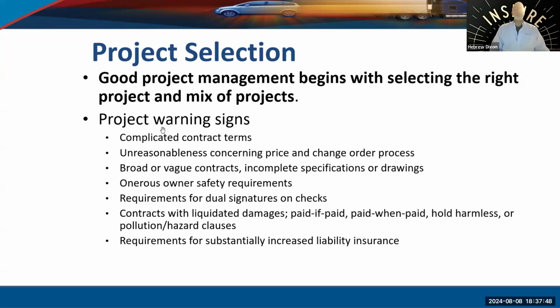In the contract, again, this is probably more setup work, but these clauses I hate in contracts, the LDs, we call them LDs, liquidated damages. Sometimes you have incentives in contracts for getting finished earlier. So that's another piece you would look for. That's a good thing. But when we talk about money and managing money, we talk about pay when paid. I think we all know what pay if paid is. If you see a pay if paid in your contract, run away. Run away.